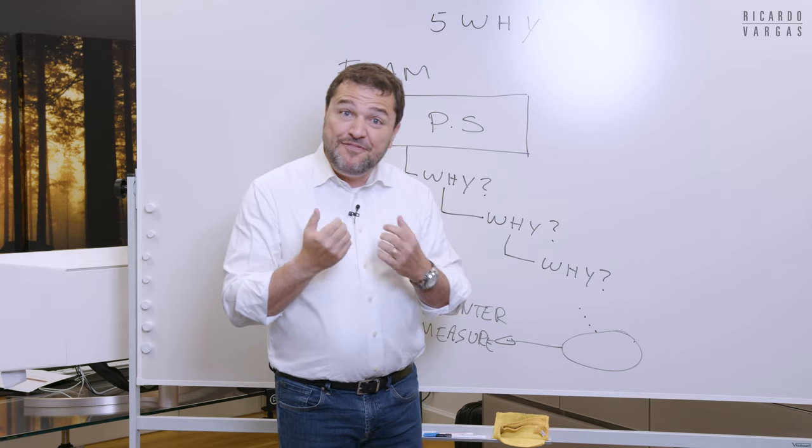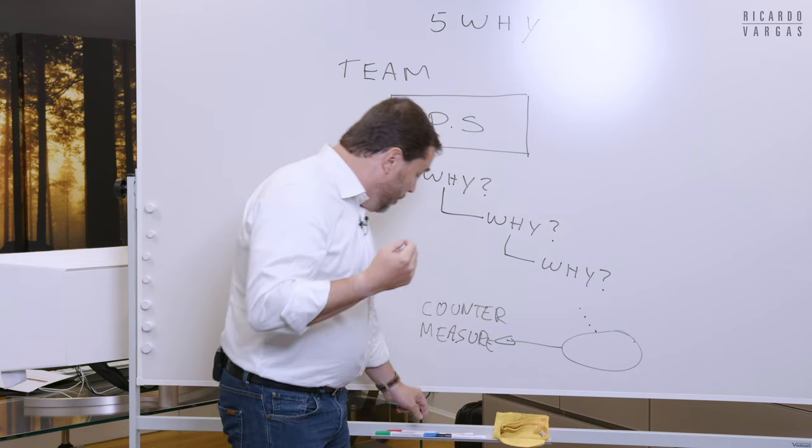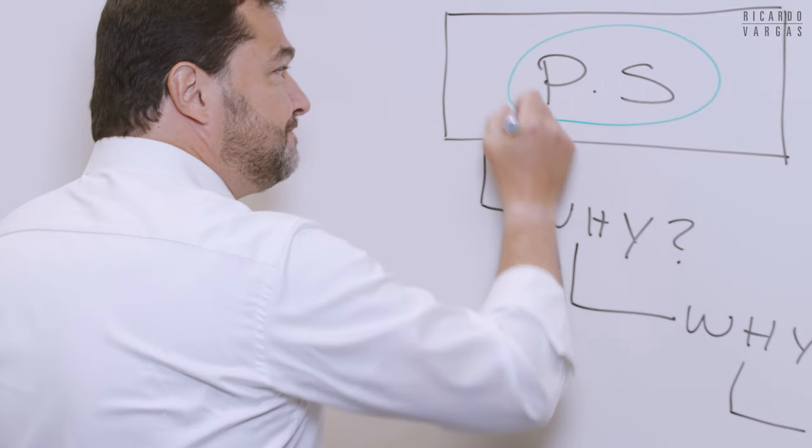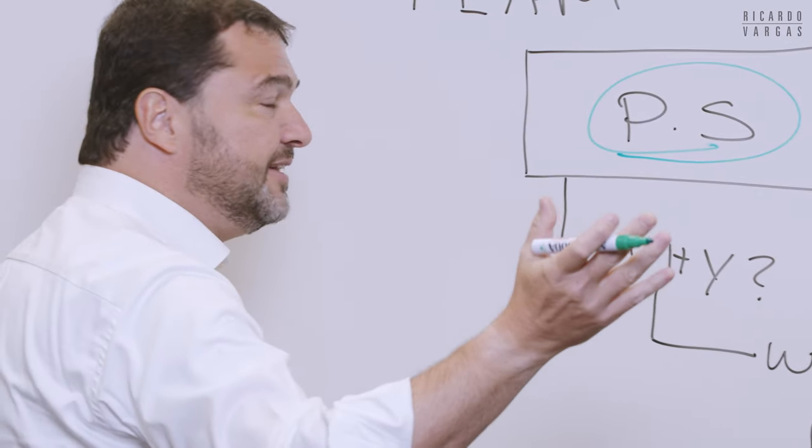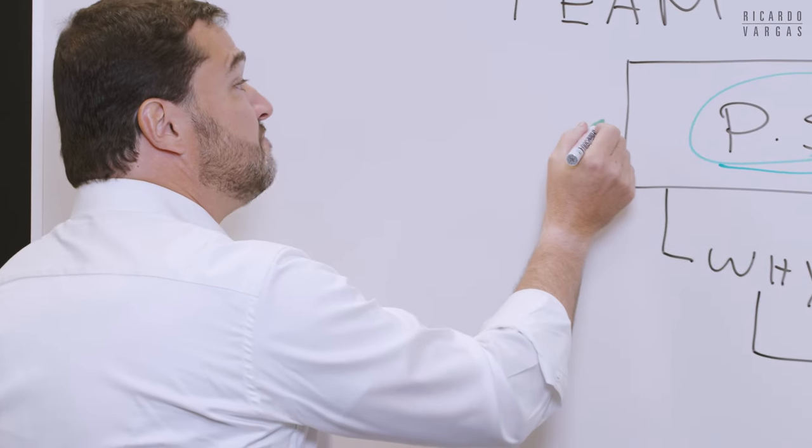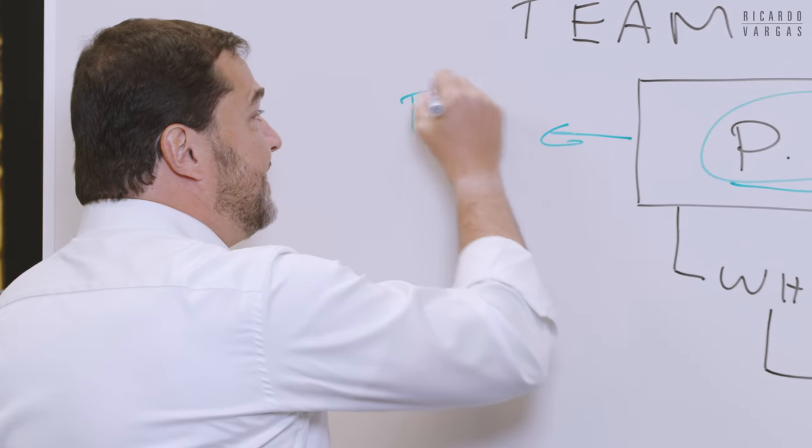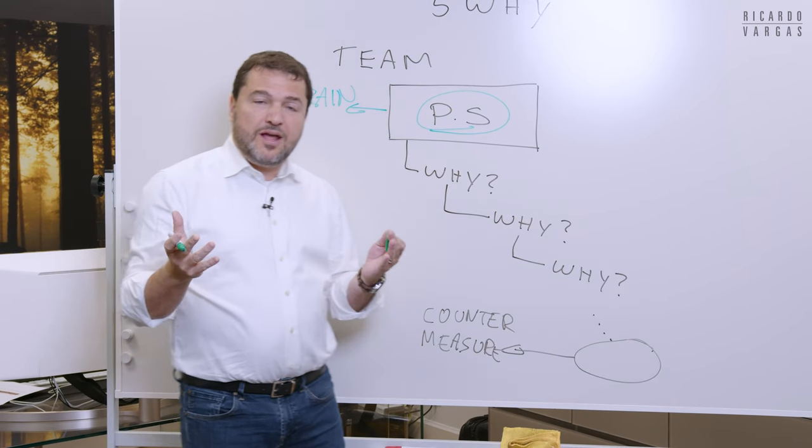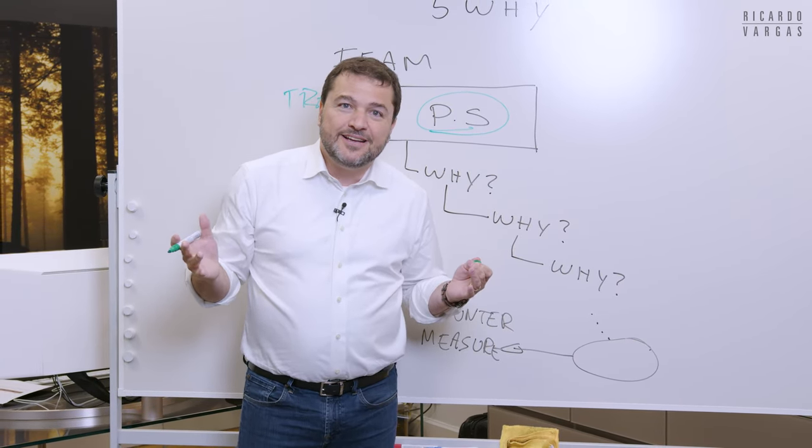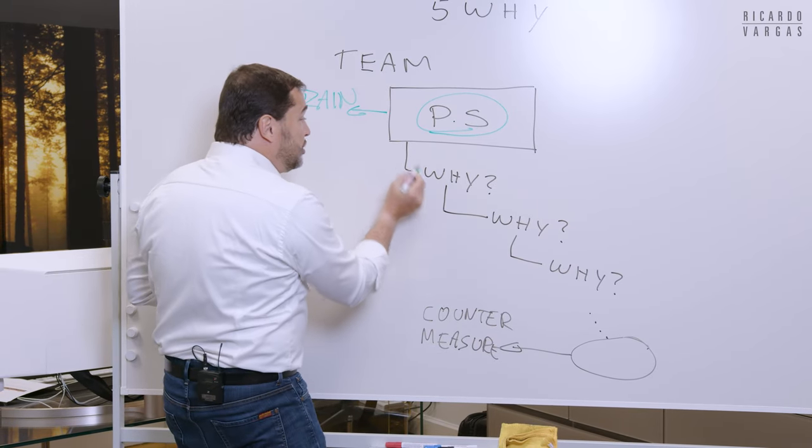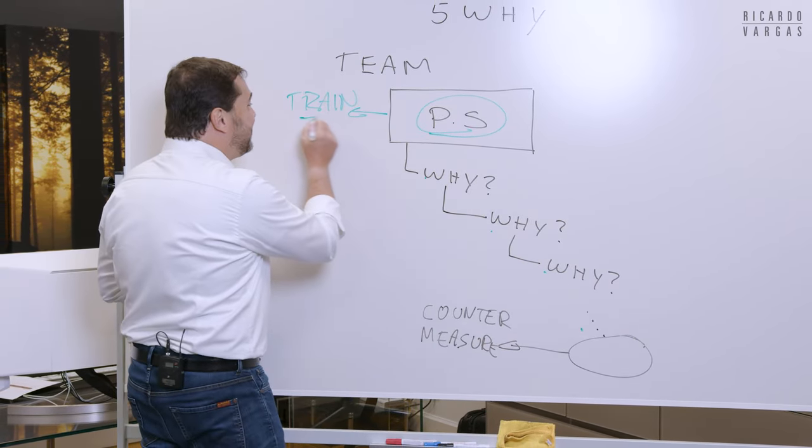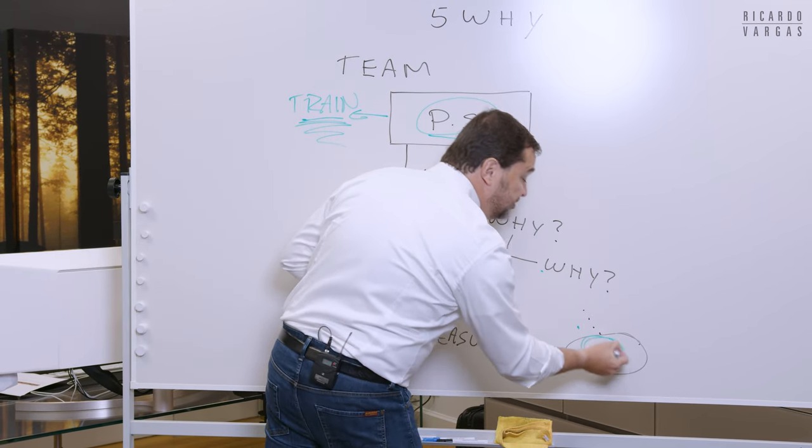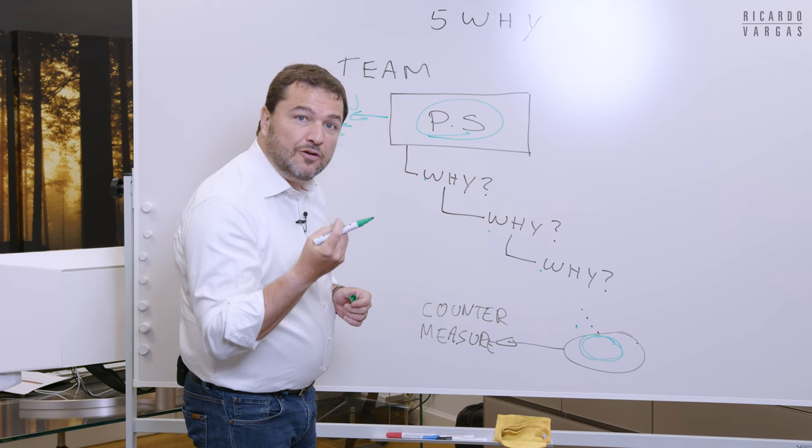And this is something very simple. Most of the time, what do we want? We want to speed up the process and we have the problem and say, people are not filling the risk register. And then you say, we need to train them. And then people say, no, it's not a matter of training. Because what happened? Because you didn't ask these whys. You were taking a countermeasure that does not address the root cause of your problem.